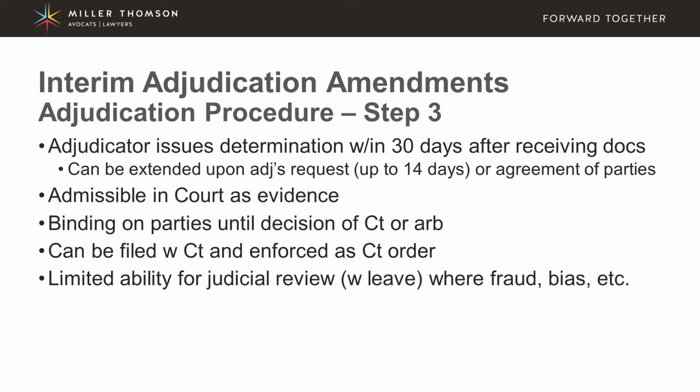Now, the adjudicator's determination is very significant because, first of all, it can be admissible as evidence in a court. It is binding on the parties unless the parties then take this matter to court or to arbitration, which could reverse the adjudicator's determination. The determination can also be filed at court and enforced as a court order.